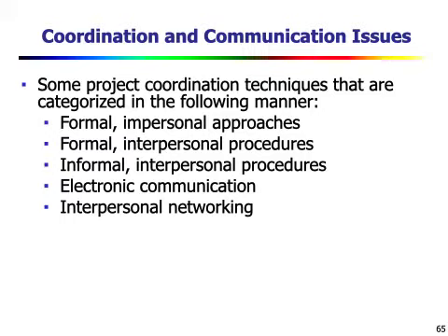Then you start the problem decomposition. Problem decomposition can also be called partitioning or problem elaboration, and it is an activity that sits at the core of software requirement analysis. That is, we simply divide, or partition, the problem into smaller problems so that it will be easier to implement.